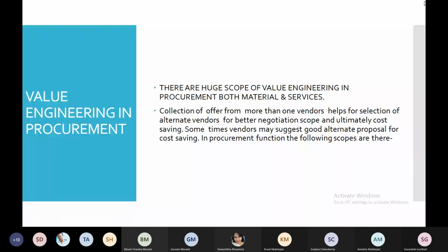Okay. I know that in some cases they have mentioned that you will have to remain with these vendors only. In these cases, one chance is there. If you critically analyze the functions or materials which they supply, you can find out that they are charging a higher price than actually required. For example, say an instrument is being supplied. It has been found in some cases that the instrument's internal materials can be selected cheaper than what they are actually supplying.